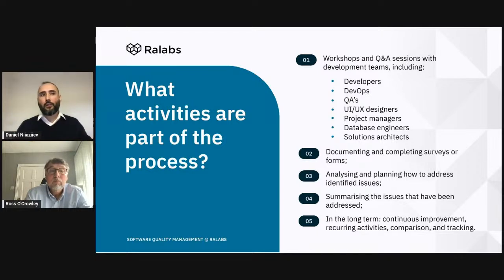So usually, depending on the size of the project, depending on how many service lines we have there, how many types of expertise are included, it can take in total, including all of the workshops and reviews, from 10 to 40 hours. But every next iteration, people are already familiar with this, with the survey review and filling in the survey.